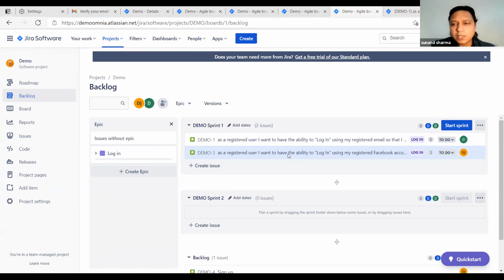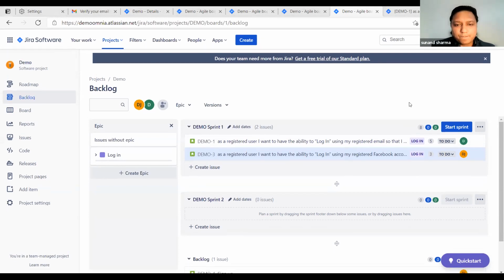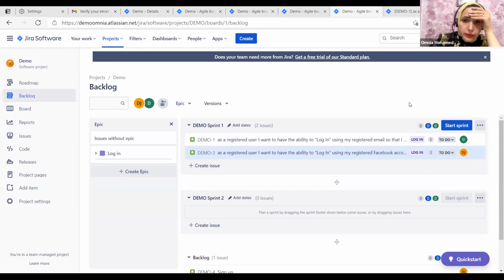Yeah. So it's always advisable to update your story points in your backlog. Obviously, you will do it before, in your refinement session, and then only you will drag it in your planning session. So for demo purposes it's okay, but always do this before. Exactly. What I am showing now is where you can access it, but I'm not doing it; it should be in the backlog refinement. When he adds user stories, they should be added with the initial sizing. That happens in the backlog refinement.